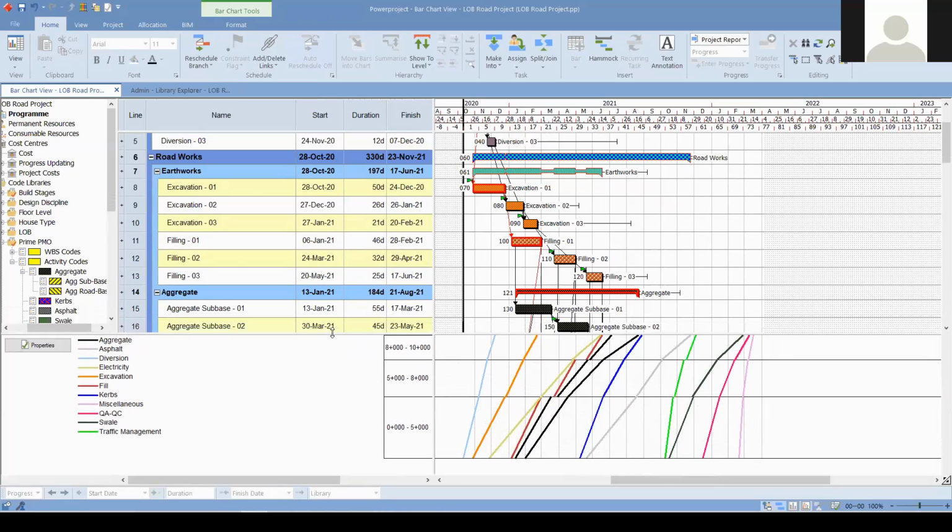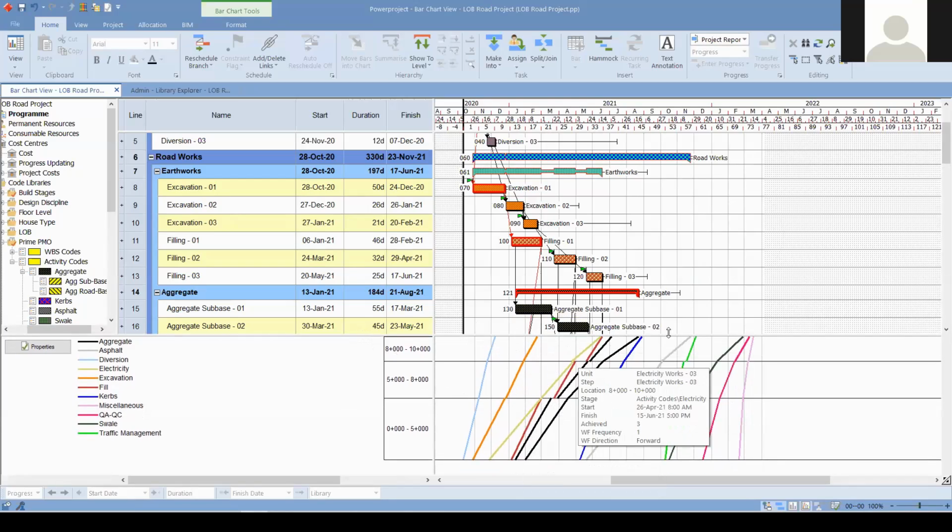So generally I would also recommend this approach as a what-if scenario. That is why you can save your original project schedule, implement the line of balance diagram, and represent all the activities in a single view.